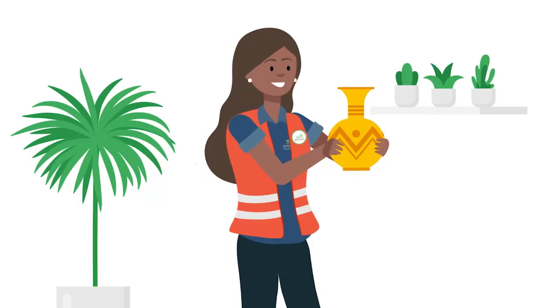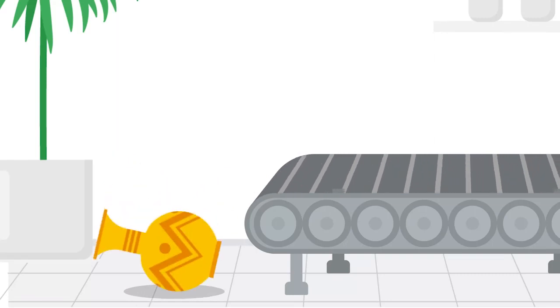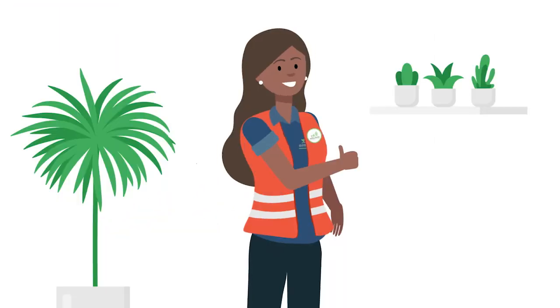This is where you'll plan the procedures to achieve the quality standards. Recall that one of the Project Plant Pals quality standards is reliability, the expectation that each plant arrives on time and in good condition. So, as a quality planning measure, you'll need to make plans with your plant provider to test the durability of your planters before you decide to use them.